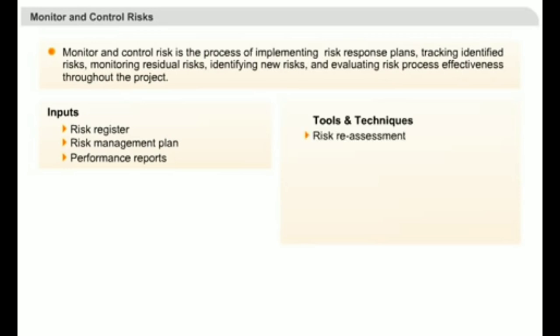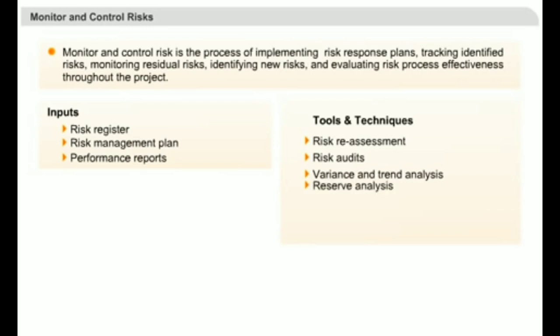The other strategy is to do continuous risk reassessment, which is a periodic review of the risk management plans. Risks are also one of the key discussion topics in project status review meetings, as team members can point out new risks. Regular meetings also ensure that team members are aware of their responsibility to always look for new risks and opportunities for the project.